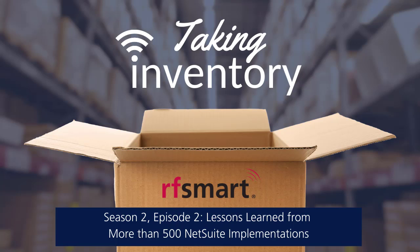During the sales cycle, they made sure that they had everyone that was going to be involved in the implementation be a part of the sales cycle. So they were able to ask questions, identify situations, and tell their part of how they work within the organization, which is incredibly helpful to the team. As they went through that cycle, they had those people involved, and then they quickly identified a project manager. Even though the software company is implementing their software, you still want to have a project manager to manage your side of the team, because you're heavily involved in that. It really is a true partnership.